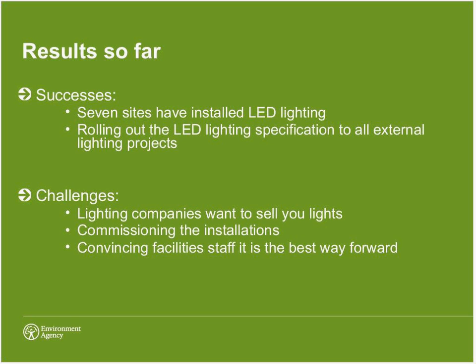some designers will be linked to lighting companies, and in the worst case scenario, we had a site which had 8 existing lights, and the design recommended an uplift to 64, which was quite dramatic and missed the ideal specification. So an extreme case, but without knowing the right questions and getting that specification right, you know, why is the light there? What's its function? So when someone does propose something, you can actually question, why have you put that there? I don't need light there.